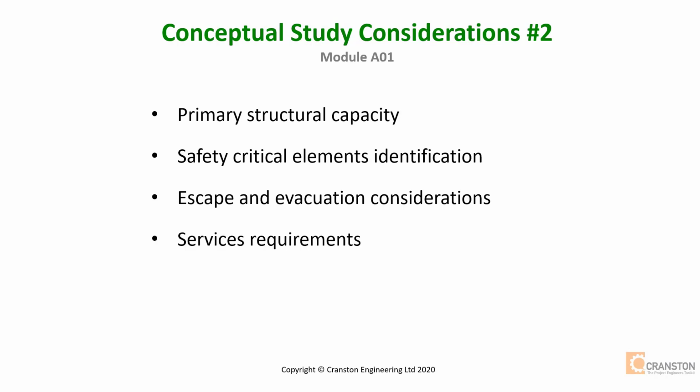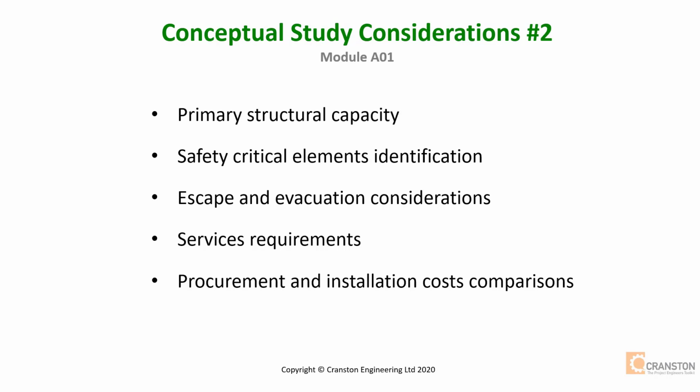The services requirements. The conceptual study will identify the initial requirements for all services and where there's not sufficient platform capacity and where upgrades are required. Procurement and installation costs. An important activity in conceptual design is the generation of options for the project and to prepare the overall project costs for each, including installation. From this screening exercise, the project team can get an idea of the sensitivities regarding bed capacity versus costs.